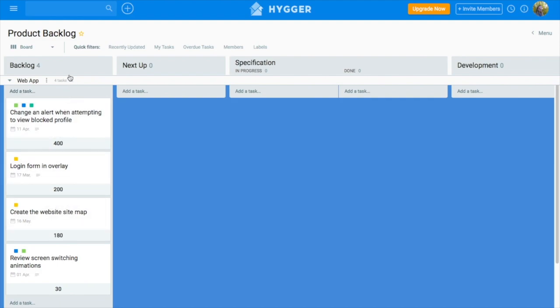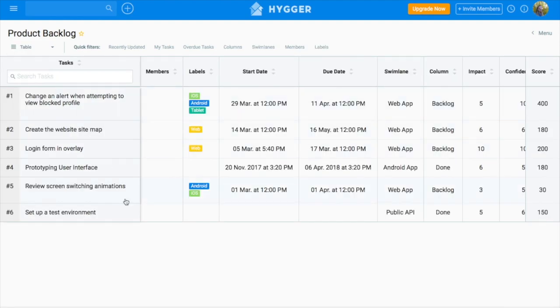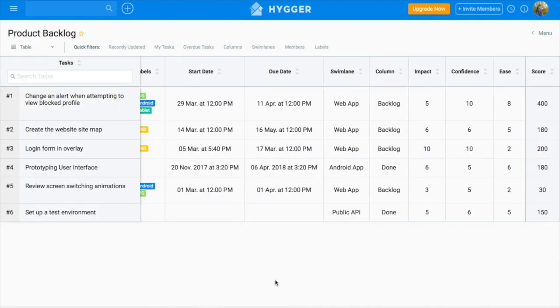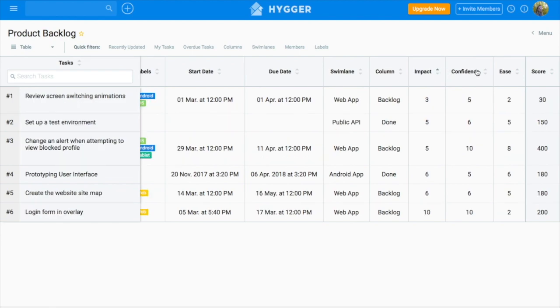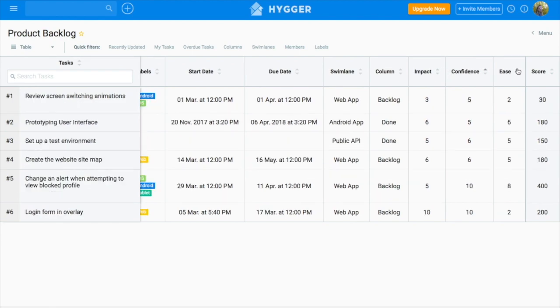To see the evaluation of all tasks off the board, open the table view. You can use filters to sort tasks by ICE metrics—impact, confidence, or ease—and its final score.